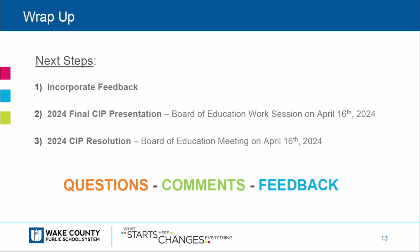Last year it was kind of a whirlwind in certain areas. So with the CIP approval, this comes from county money, right? Yes, correct. It's 80% funded by debt and 20% funded by cash. So by us approving this plan, it's what we're asking the county for? Essentially, we ask them to fund the total CIP. All the county does is agree to do it for 1 year in advance, although they're statutorily required to fund the whole thing. But technically, in terms of what the resolution asks for, it says here's our 7-year plan, we ask for funding for it, and they agree.